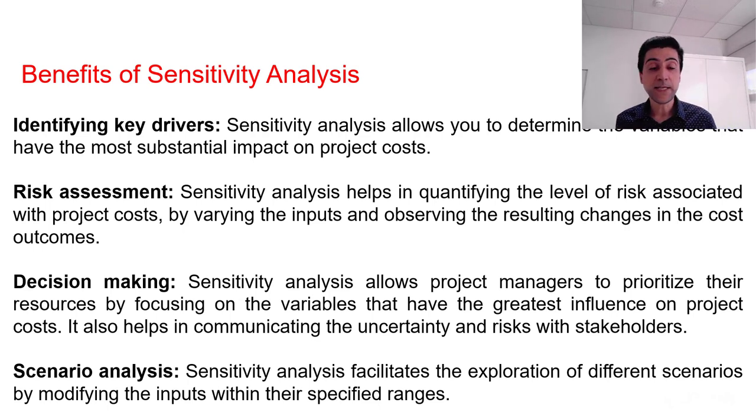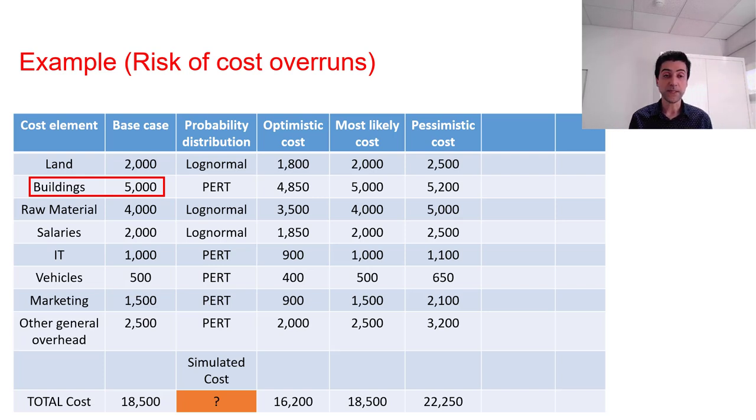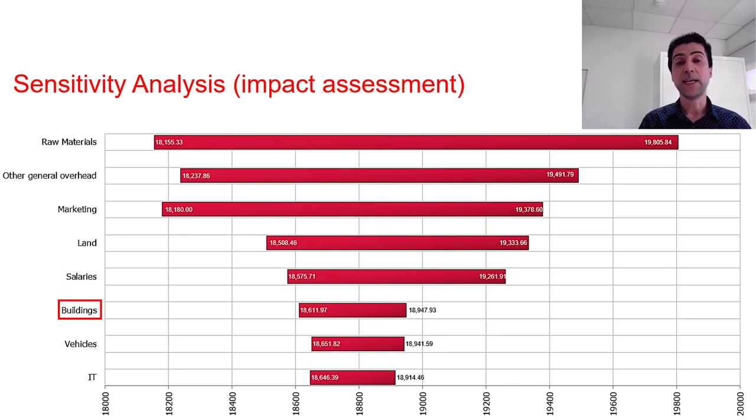Back to our example, in the first attempt in our table, we saw that building is the largest cost center with the base case of 5,000. In a naive approach, we can consider that as the most impactful item in terms of total cost. But when we do the sensitivity analysis, we can truly find out which variable is the most impactful in terms of introducing variance to the output. And it is not the building which is the biggest cost center. In our example, raw material is appearing to be a very sensitive and impactful input variable. In other words, our total cost is most sensitive to variations in raw materials.